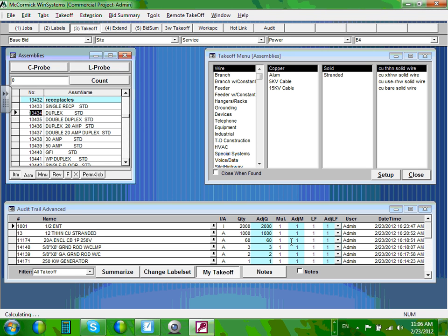We're going to only take power and light, no low voltage, no security, no phone and data. Any questions about these three steps? We don't want security, phone and data, and fire alarm system. All the low voltage, we're going to subcontract them. We can take them from this software, guys, but because of the amount of time that we have right now, feel free to do it, but what I want you to do is take them as a subcontract now.